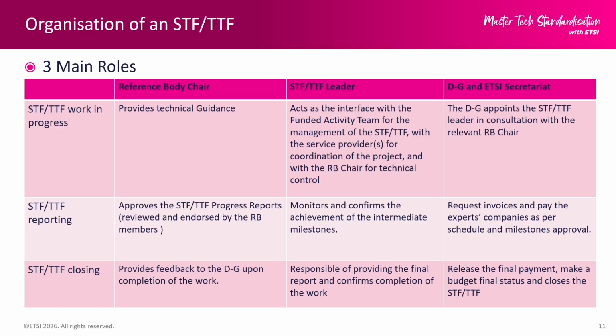Now, regarding reporting, progress reports are prepared during the project and are reviewed and endorsed by the relevant reference body before being approved by the chair. These reports confirm the achievement of intermediate milestones, which are also used as a basis for expert payments. Finally, at the end of the STF or TTF, the reference body chair ensures that feedback on the overall work is provided to the ETSI Director General.